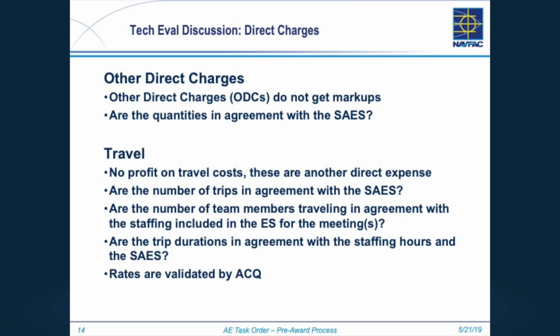This is where I had it. Other direct charges, you're also going to be looking at reproduction. If you didn't ask for any hard copies, I wouldn't expect to see any copies on that page. If you said none, if you said I just want electronic, if you didn't even ask for any CDs, you probably do need a final set or a set for construction because the field always needs hard copies.